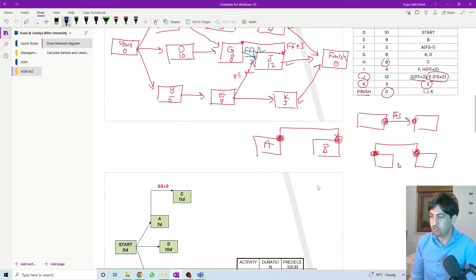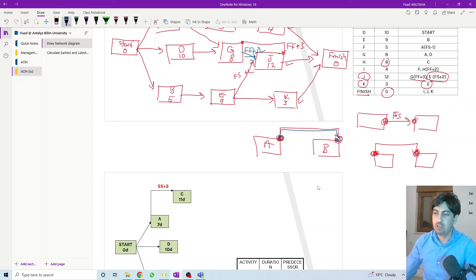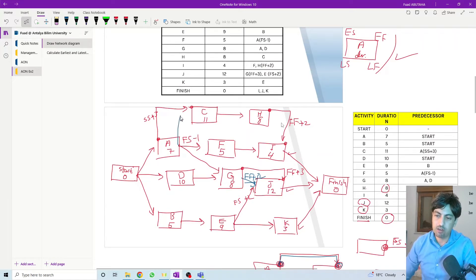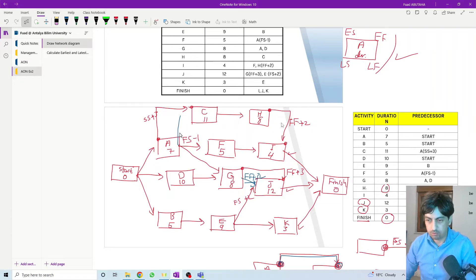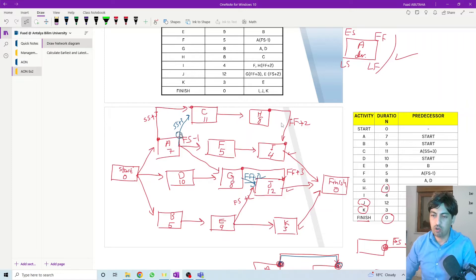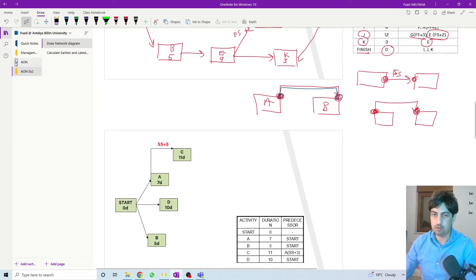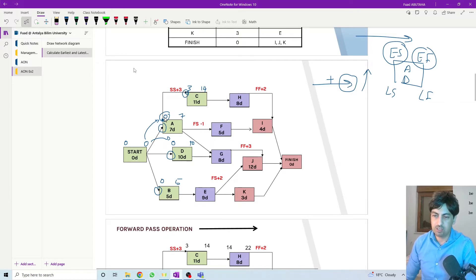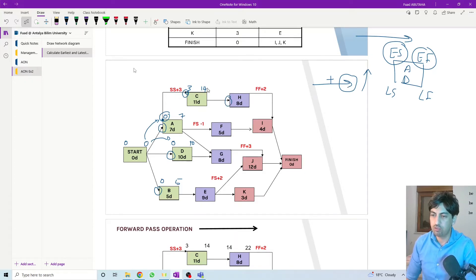That's why I strongly recommend drawing the activities in this way — it makes the calculation easier and avoids confusion about which value to use. If drawn correctly: zero plus three equals three, three plus eleven equals fourteen. Coming to the next activity, we have only one option so we transfer fourteen directly. Fourteen plus eight equals twenty-two.